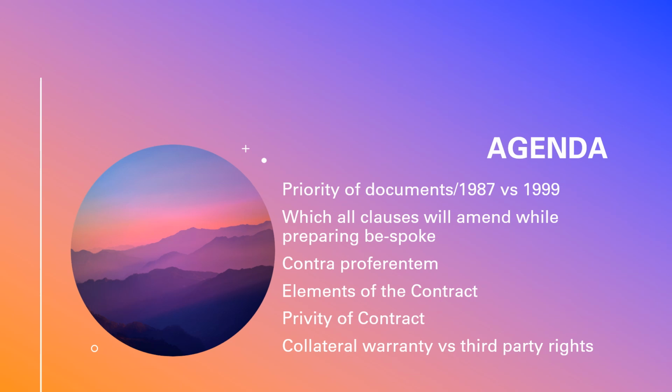If I'm a contractor signing a contract with an employer, there are only two parties in the contract, maybe sometimes a JV. So the only one who can sue me is the employer, and the only one who can be sued by the contractor is the employer. No other third party is authorized or supposed to sue on the contract. This is called privity of contract.